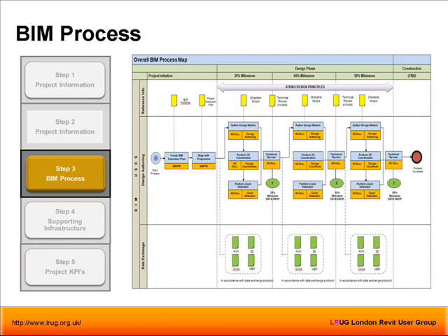Okay. So what we have done, following the Penn State idea, once you've identified your BIM uses, is to understand where that fits into the whole process. So this particular project, we've gone for 30, 60, 90 milestones, and trying to understand what we're going to do at what point. So here, we're authoring design models, we're doing 3D coordination, and we're doing clash detection. That's really the key objectives.